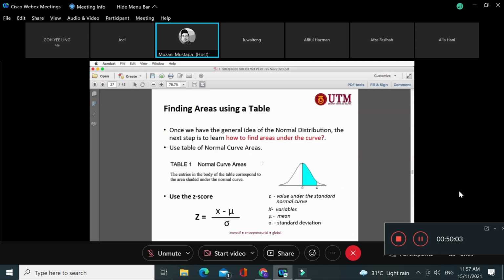Okay, so that's why we need to find the area using a table. This is another equation that we can use. So find the z-score. The z-score is the value here. So for the 12 weeks earlier, with this 14.64 and this 9.36, what I want to find is Z. I know this is 14, but how about this Z in the middle? If, for example, the contractor says I expect you to complete before 15 weeks. Okay, let's say I want to complete in 14 weeks.